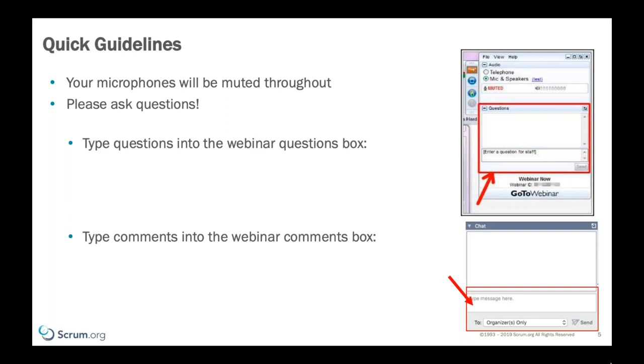And part of that refinement might be doing some design work, doing wireframes, getting paper prototypes in front of actual users, running through those tests, running through usability scenarios with users with the existing version of the application and seeing where the improvements can be made. And that's going to add more things to the backlog. That's going to refine the things that are already on the backlog. So it just adds to the burden of the team's requirements for refinement. Same as all the other refinement around security, around architecture, around coding and engineering practices, around DevOps. What are we going to do over the next three sprints to best benefit and provide value in the product?